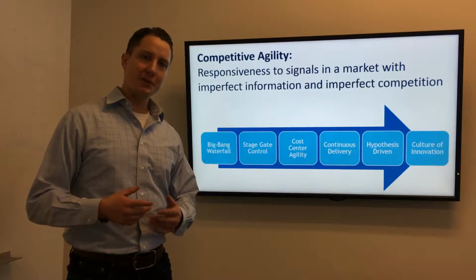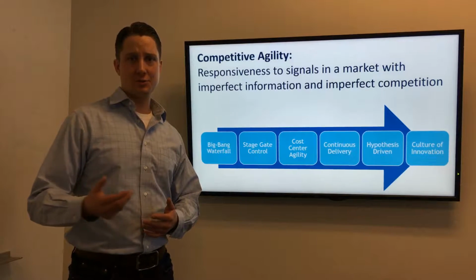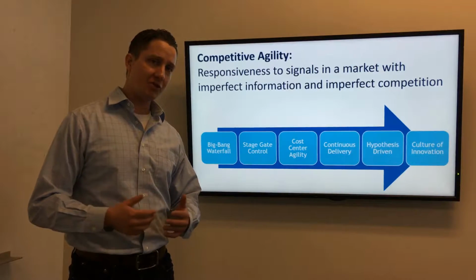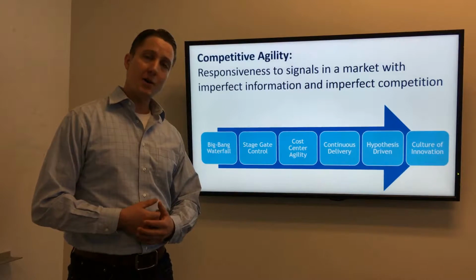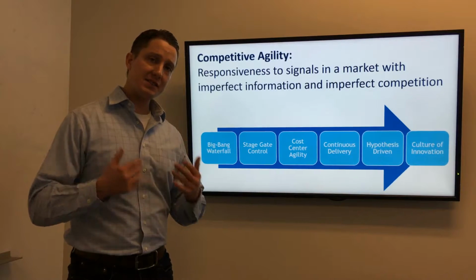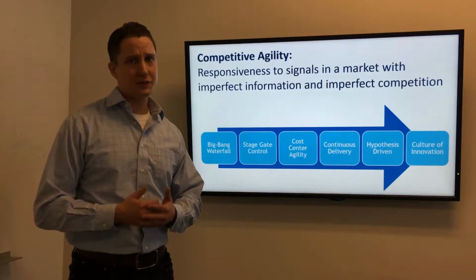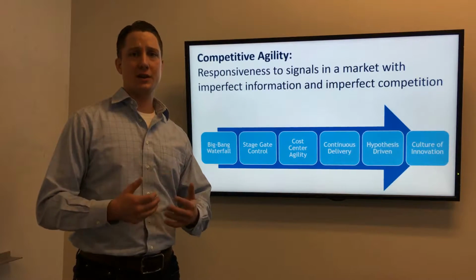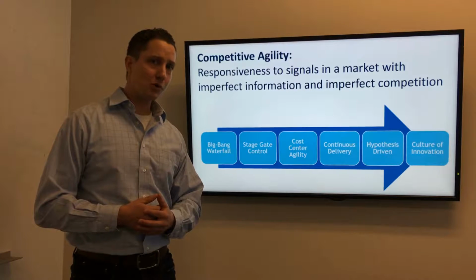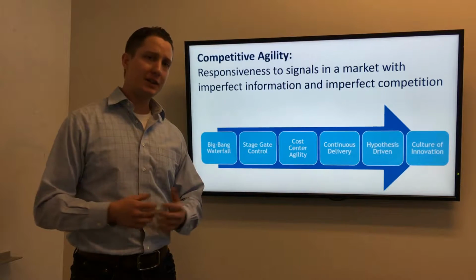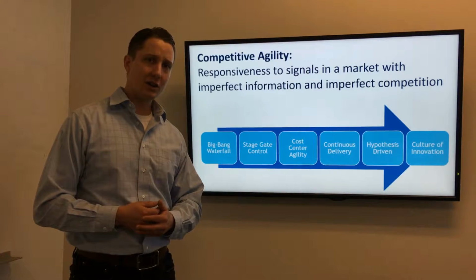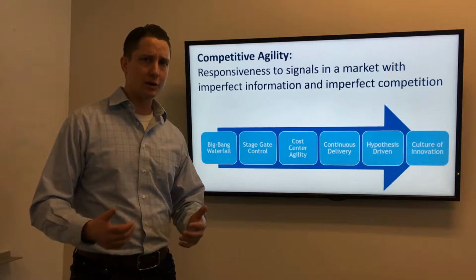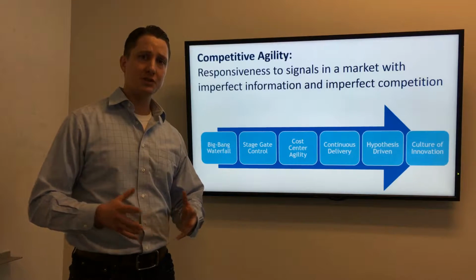As you begin delivering multiple projects, stage gate control is an important evolution in the economics of managing a digital product value stream. What it does is add a sense of cost of delay, even if it's just the cost of the project managers, who represent the overhead of each project. You don't want projects to last indefinitely. You don't want scope to increase unchecked, because it's going to cost you more no matter what. So you plan a little harder and you hesitate at those stage gates.